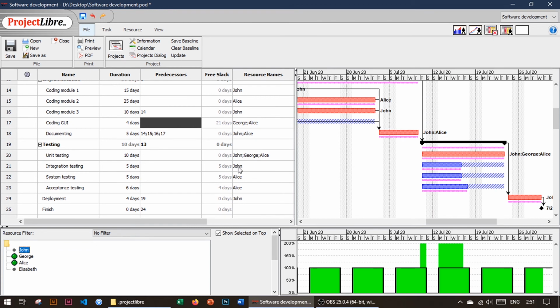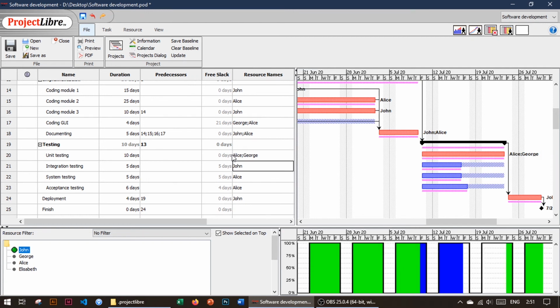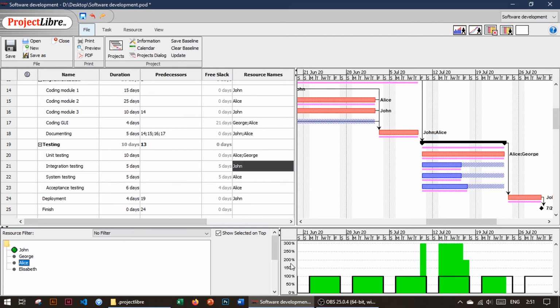There are several possible ways to fix this situation. The easiest one, of course, is to remove John from the employees involved in one type of testing, and this will save our time. Of course, it can be problematic if our task strictly requires some workforce, but in this situation, let's imagine that it's possible. We have a similar situation with Alice at the same place.